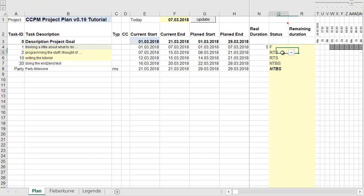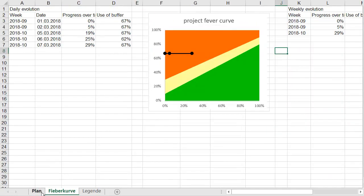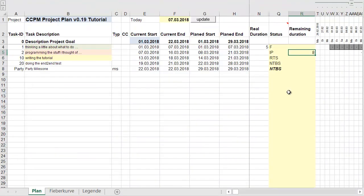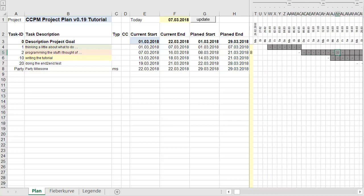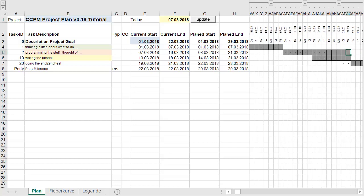The finished task turns green, and the next tasks turn yellow — ready to start. I start programming and had a very good idea, so I estimate eight days. But buffer consumption is still high because the buffer is calculated as one-third of total project duration, and even good ideas aren't always enough.